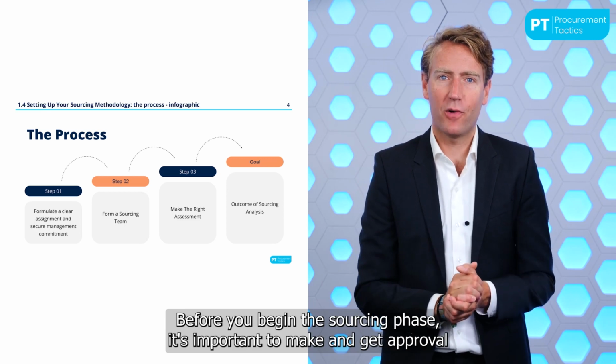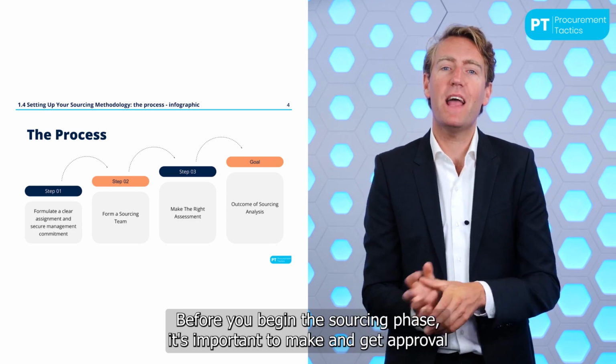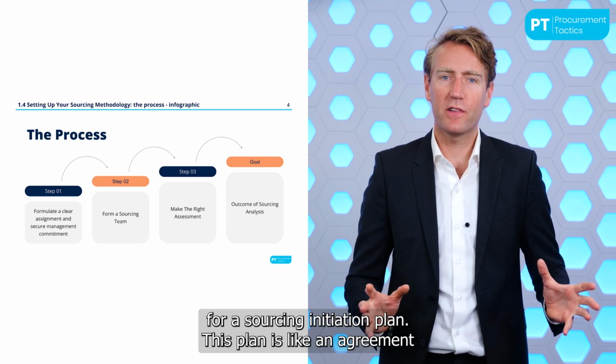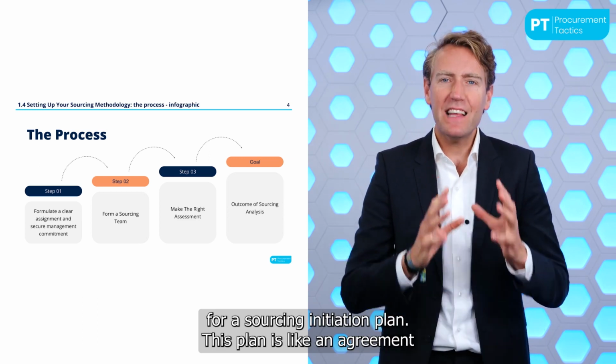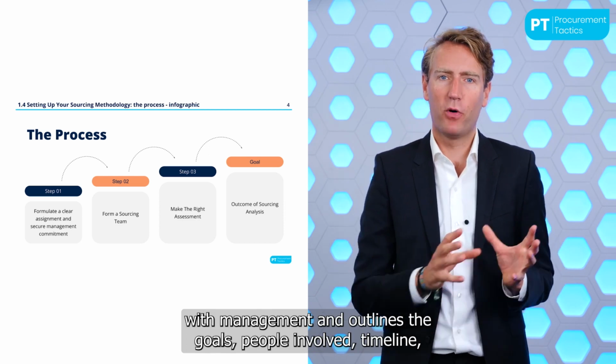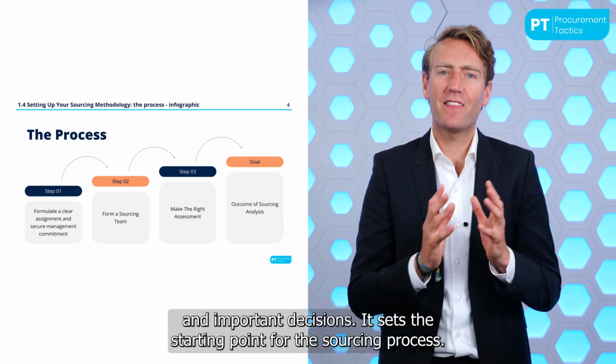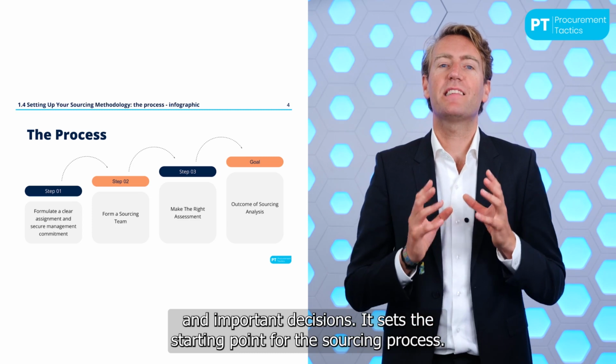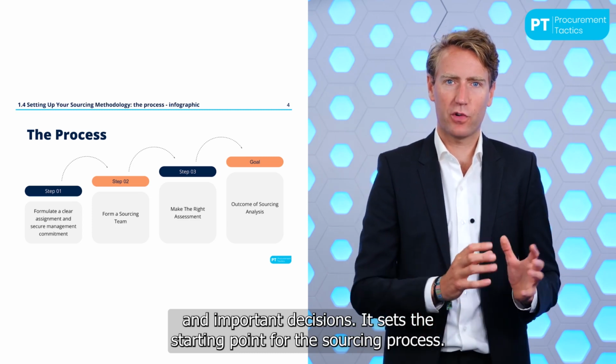Before you begin the sourcing phase, it's important to make and get approval for a sourcing initiation plan. This plan is like an agreement with management and outlines the goals, people involved, timeline, and important decisions. It sets the starting point for the sourcing process.